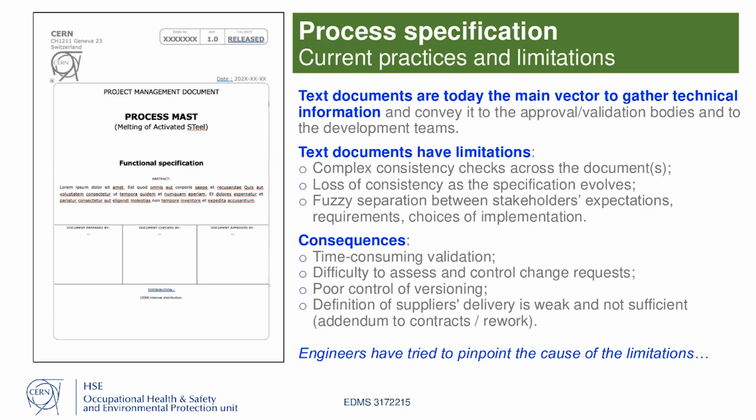is mixed up with the technical solution that you propose, which means that you have time-consuming validation, difficulty to assess and control the change requests, poor control of versioning, and something that I experienced again is the definition of supplier's delivery, for instance, the foundry to melt our waste, is sometimes weak, not sufficient, and this leads to addendum to contracts to rework. I tried to address these